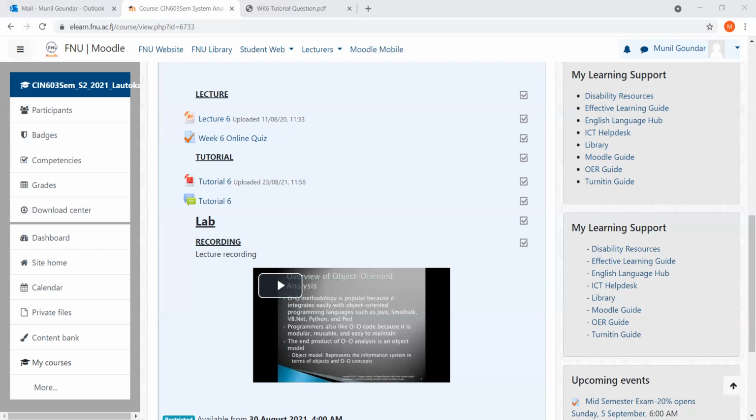Next up, you have activity G. Now, activity G is dependent on both activity D and E. So you have D and E. So which one would you take in? 7th of July or 13th? You will take in the value 13th of July, unless and until both of them are completed, only then you'll proceed. So over here, it is 13th of July, and then 21. So it takes 4 days, so 13 plus 4 is 17, minus 1 would give you 16. 16th of July, 21.